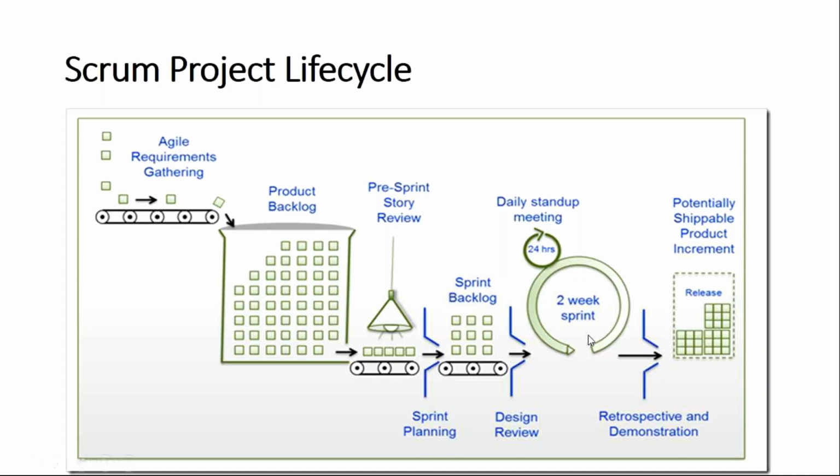In the sprint planning session, definitely each and every user story is reviewed. I hope you're familiar with user stories and everything, right? Yes, I am. Okay. So in sprint planning, they ensure the items are not at an epic level. Even if something is at an epic level, in the pre-sprint review they split it into user stories and work on the sprint backlog.